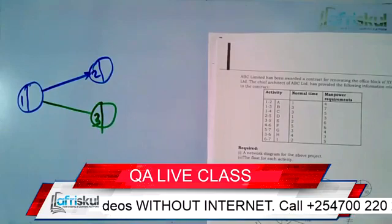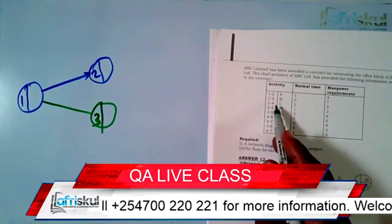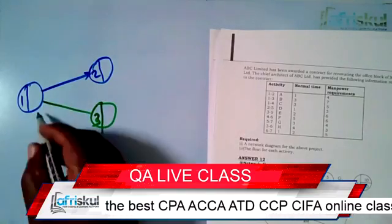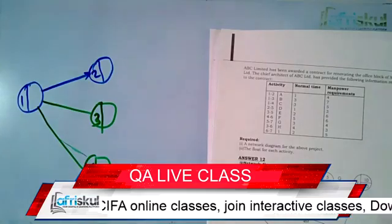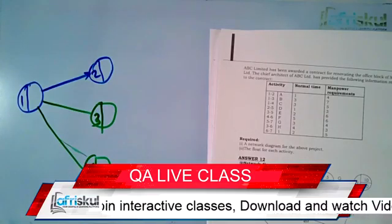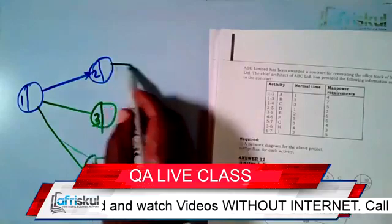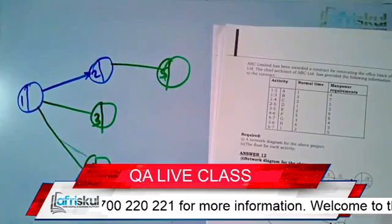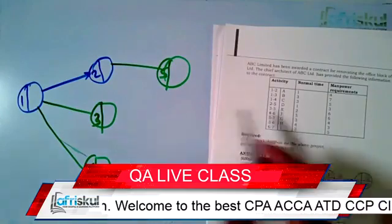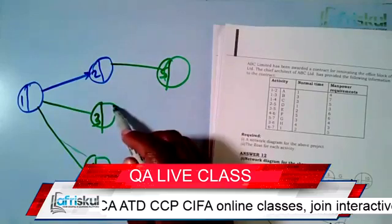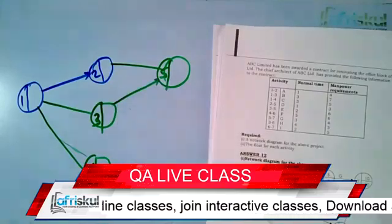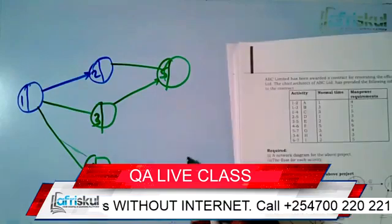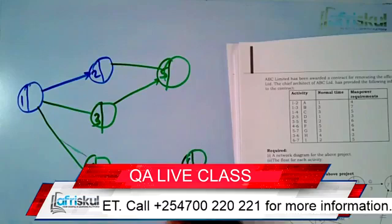We have one to three, then one to four — I introduce a fourth node. After that, we have two to five, so I introduce node five. Then three to five — three and five already exist, so I simply join them. Then four to six — I introduce a sixth node.